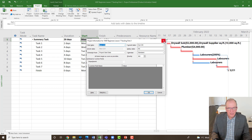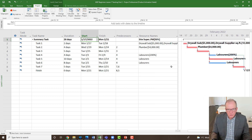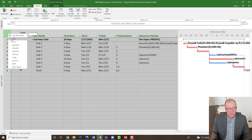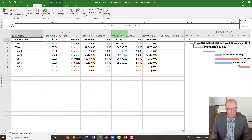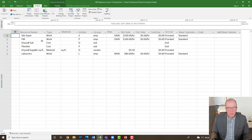These resources make this a resource and cost loaded schedule that we're updating and revising, so we should be able to see our total costs and then when we revise it we should see how it's changed. If I click on the square icon box and right-click, I can go to the cost screen. You can see I have not saved a baseline yet, but I do have costs added — right now we've got sixty-one thousand eight hundred and forty dollars of costs on this project.